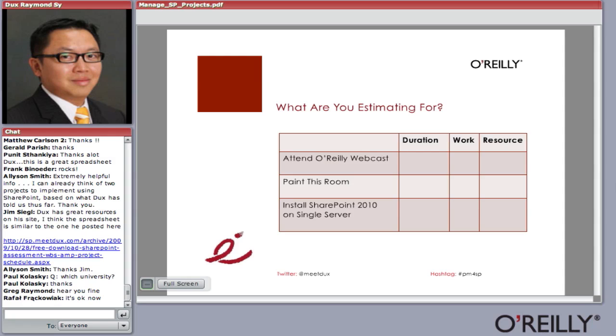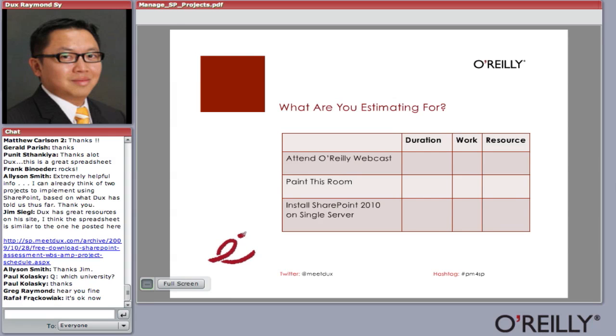Second, after you've defined your tasks, you have to define your estimates accurately, or, I don't like to use the word accurate, but you have to be serious in defining your estimates. Okay, so for example, let me grab a pen here. Let's say you've got 3 tasks here. One is to attend this webcast. Second is to paint this room, and third is to install SharePoint 2010. So for example, attending this webcast is a 1-hour webcast. All right, I'm going to put 1 hour right there.